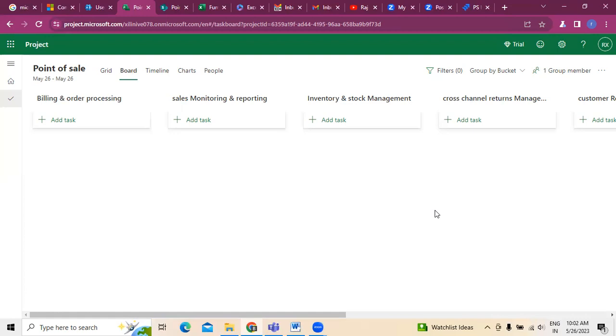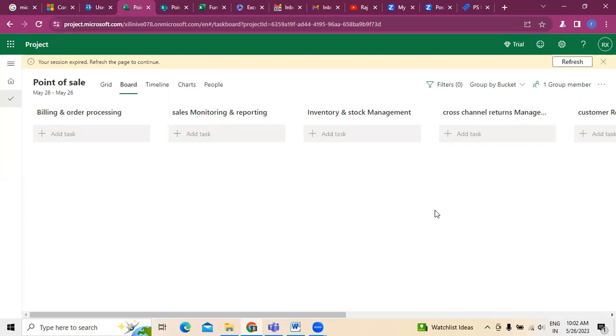Now, what is happening? For example, you have written code for a particular functionality and given it to the deployment team and the customer. Now you get a request from the customer to make some changes to the existing ones. What you have to do now is go back to the analysis phase, and again come back to planning and design, which incurs a lot of effort. First of all, manpower effort is more. When manpower effort increases, automatically the cost will also be more.